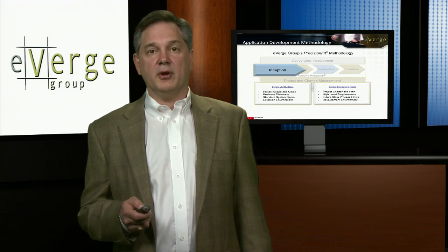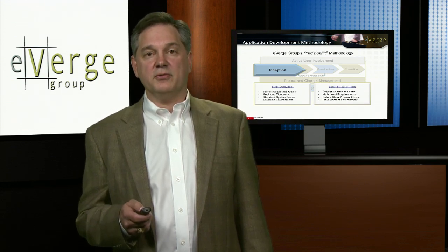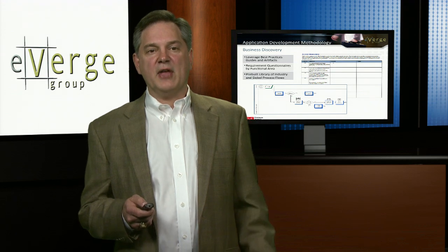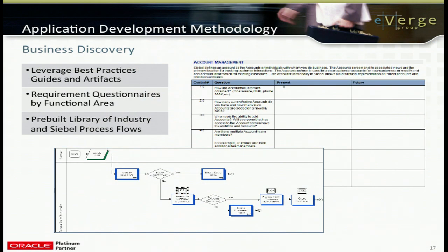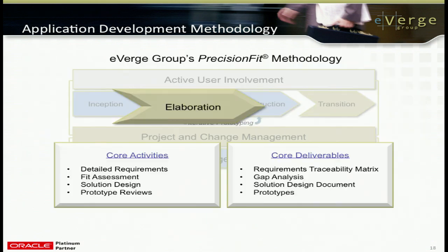that are delivered and approved by our clients as a function of the phase. And as an example of business discovery, here's a particular aspect where we go into a project. We have predefined processes in many of our practices that are based on the commercial off-the-shelf software that we deliver. And we also have predefined templates with questions to help provoke some of the requirements that we're going to eventually capture and some of the things that we want to understand about our clients.